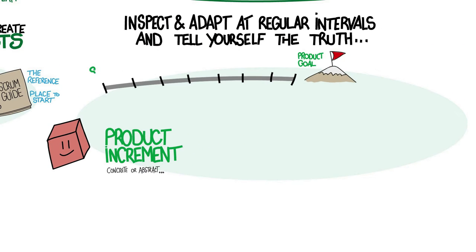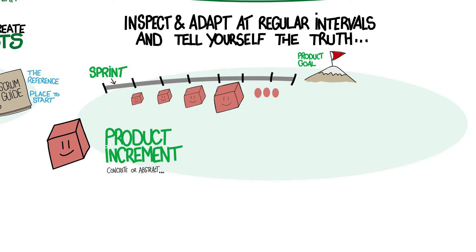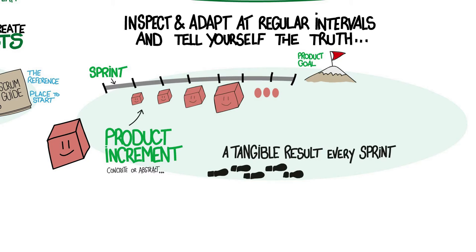Scrum works in short iterations called sprints. At least once per sprint, the Scrum Team produces a new version of the product with a few new or upgraded elements. Scrum calls this the product increment, but I like to call it a tangible result. Each sprint produces a tangible result that supports the overall goal — something you can use, sell, or test in real life, and most importantly, something the Scrum Team can review together with its stakeholders.